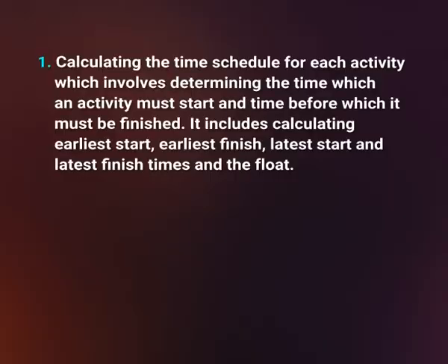Application of CPM includes several steps to be followed. Number 1, calculating the time schedule for each activity, which involves determining the time at which an activity must start and the time before which it must be finished.